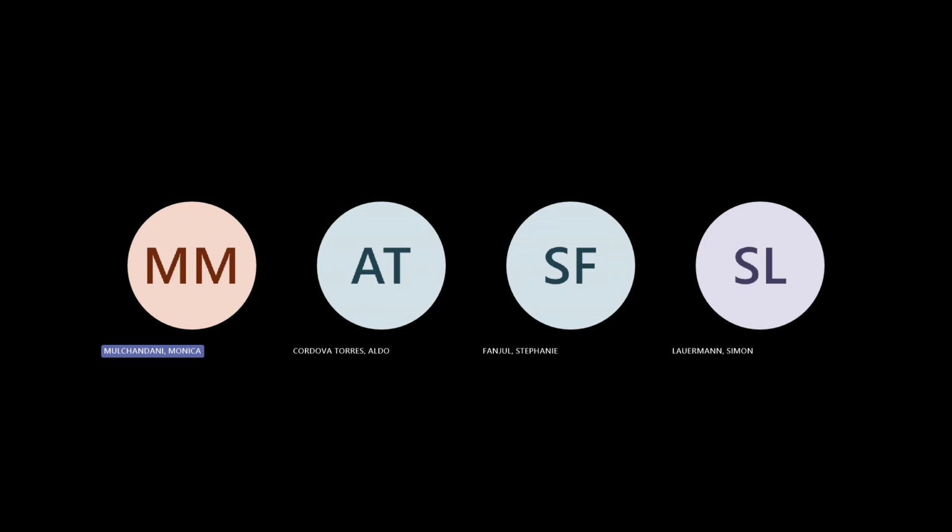So I'll just touch the status element to familiarize what it holds. You have seen us talking about it, or you yourself have dealt with it, where the status is PCPSAC, things like that. The status classification is a three-element part where the first element stands for the department which works on it. This doesn't hold true in all cases, but let's touch the main plain vanilla case first, then I'll tell you the various differentiations. So the first one is the department which will do the task.